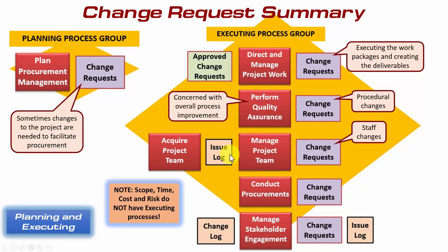Now, manage project team is where usually the project manager is actively managing each individual within the team to ensure that they perform according to the plan. There may be several situations that arise here, such as some may leave the project for whatever reason, you may have conflict between one or more individuals, or for external reasons you may have low morale on the project. Whichever of these may occur, it's the project manager that will be working to resolve such issues. And as a result of that, change requests may need to be raised, most likely to change certain members of staff to make sure they work as a cohesive whole.